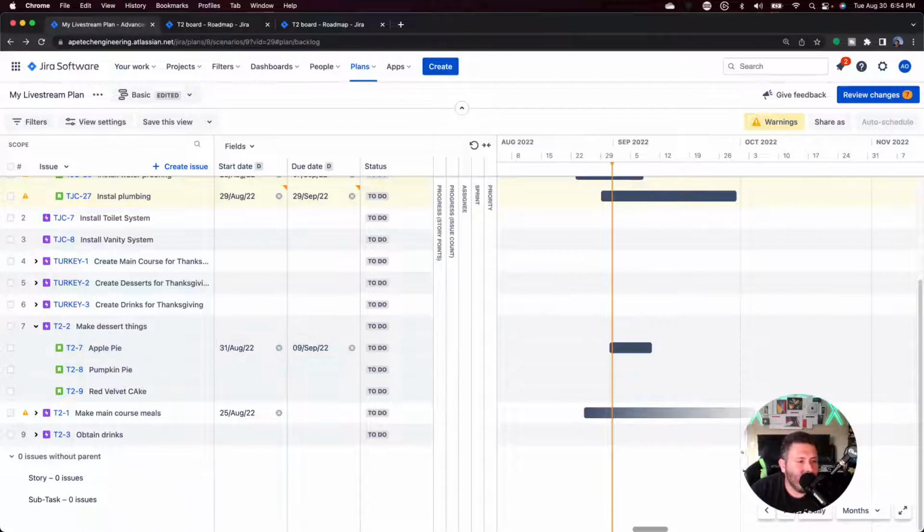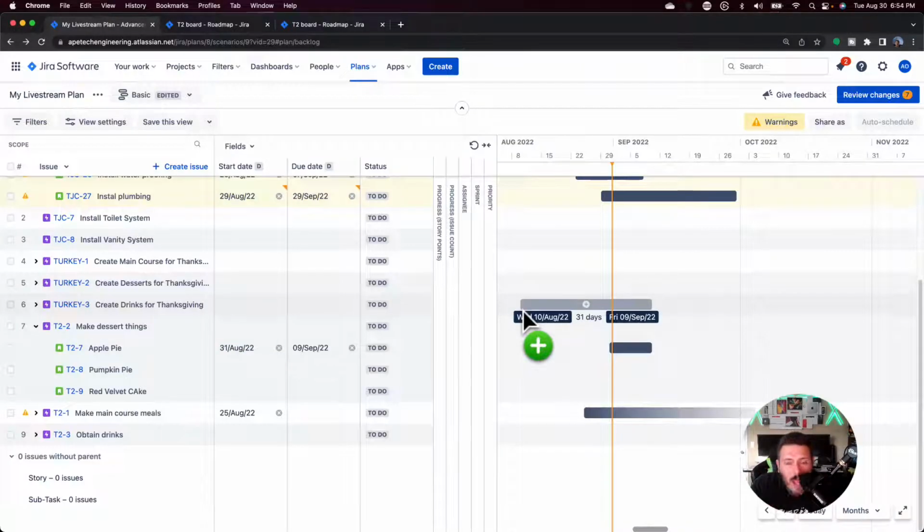So Gary, to answer your question, only blocks appears to be, well, only is still a very strong statement, but only blocks seems to do it. So it seems reasonable that it would be the only link type. Yeah, and it makes the most sense, right? Because when you think of blocks, you're automatically thinking of a dependency or an impediment, right? And guess what? Also, if you're a scrum master and you're doing your daily scrums and you run into that, hey, what are the impediments for today? Well, guess what? This is where you're going to want to make sure.